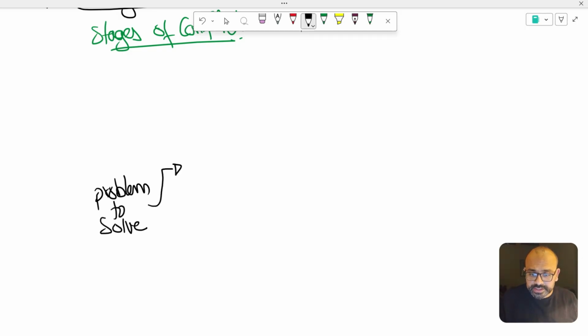The second stage is disagreement. Disagreement is a stage where they disagree with each other, but they are open to talk. Both parties have facts, they are open to talk. And when they are open to talk, your input should come here, the solution should come from the project manager at this point. Then the third stage is contest.